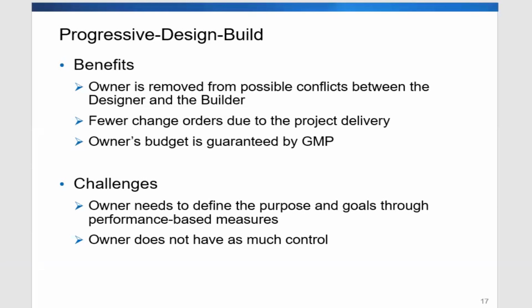And for this type of approach, the owner also doesn't have much control over the design process because the design process is internal to the design builder team. And any coordination is basically between the designer and the contractor. In this case, since there's no separate agreement between the owner and the designer, there's no way that the owner can enforce some of their preferences. Once it's a separate team, I think they do what they need to do internally, right?